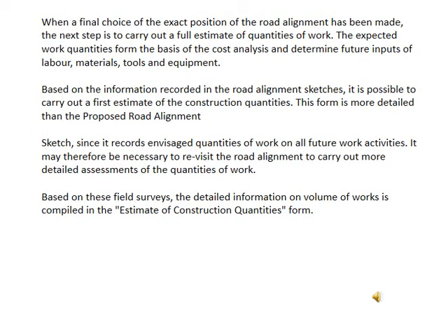When the final choice of the exact position of the road alignment has been made, the next step is to carry out the full estimate of the quantities of the work. After the road alignment has been made, we have to estimate the quantity of the work. The expected work quantities form the basis of the cost analysis and determine the future inputs of labor, materials, tools, and equipment.